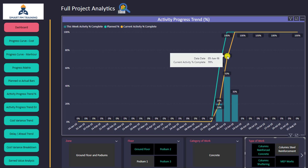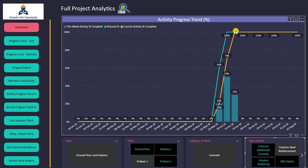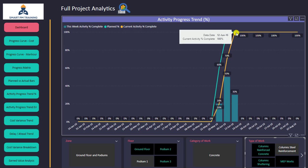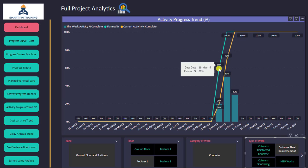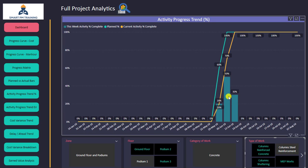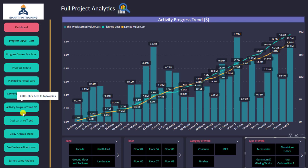I can also see the cumulative at each point — in the second week I achieved 50% but overall 70% of that activity, then completed 100% in my third week. I can compare it with the plan: the planned line is shown and at each week I can see what was expected. This is very valuable to review the trend of a particular activity.